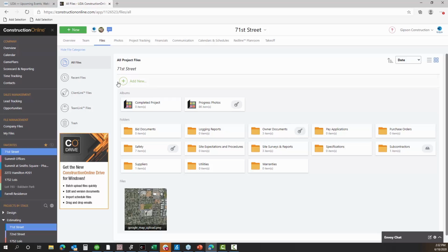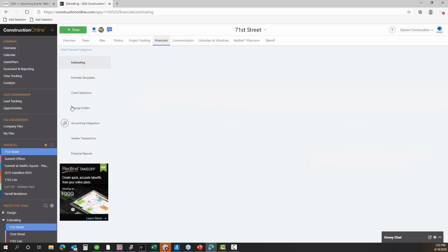Yeah, exactly. And I think two of the things that I would recommend taking a look at there is, one, within your financials, doing an estimate versus actual report so you can really see how that project budget played out in the end. And really it's helpful to do that throughout the project as it's progressing along for sure. But if we're thinking about that end of project closeout or evaluation of how we did, the estimate versus actual report is a really great one to look at.